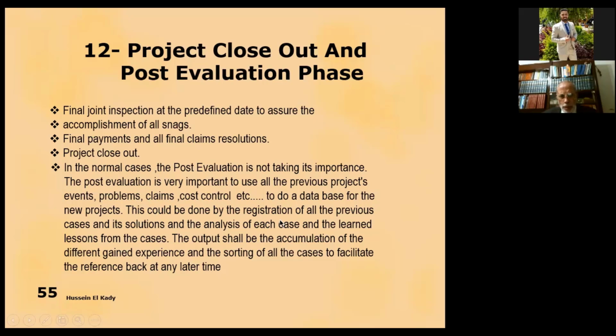This could be done by registering all the previous cases and their solutions, analyzing each case and the lessons learned. The output shall be the accumulation of the different gained experience and the sorting of all the cases to facilitate reference back at any time later.